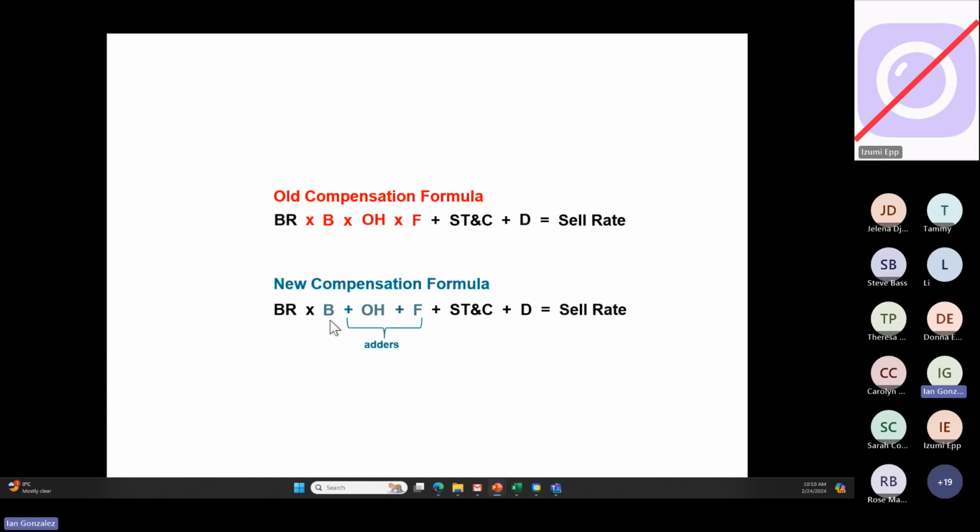Now the contractor will have to find out what that fixed number is. And it's going to be a little higher than what the multiplier is, because they have to account for their manpower complement, where there's a certain portion of senior people with higher base rates. So you can't just get an average; it's usually a weighted number. And then they have a fixed overhead and fixed fee.